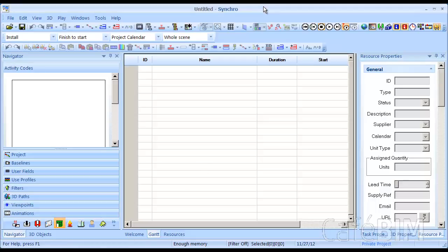In this video, we'll explore how to add and link new tasks. But before we can start adding new tasks, we need to define when the project start date is so that when we add new tasks, they start as soon as possible, while that soon as possible is the project start date. Alternately, we can also define when the project end date is and then work backwards.